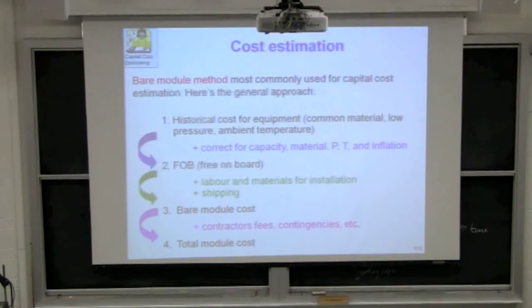It's basically FOB sets where the seller's responsibility ends and the buyer's responsibility begins, is really what it comes down to. Okay, so when I've bought equipment in the past, the terms were FOB Osaka Airport. What that meant was that the seller was going to drop the equipment off at Osaka's airport. I was responsible for getting it from that airport into Canada and delivered and installed. FOB tells you where the cost lands up, on the seller side or on the buyer side.